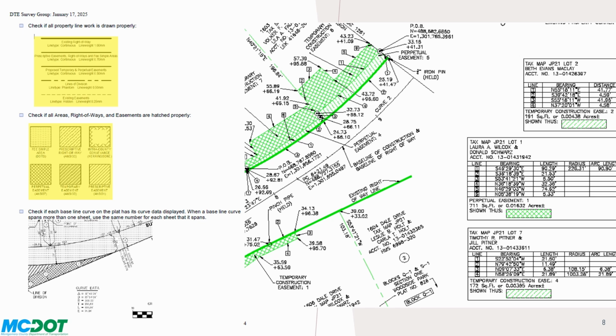This is especially relevant when a project has multiple firms preparing, creating, and even sealing plats. In these cases, it is the lead consultant, the major contracted firm's project manager and sealing surveyor, who will determine the consistency across submissions by their subcontracted firms.